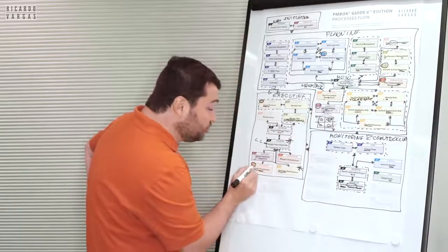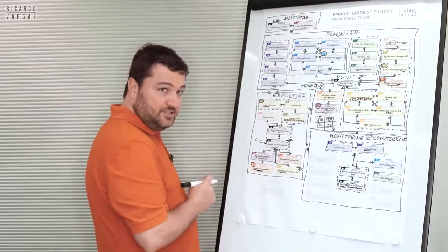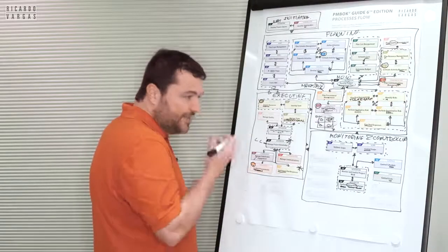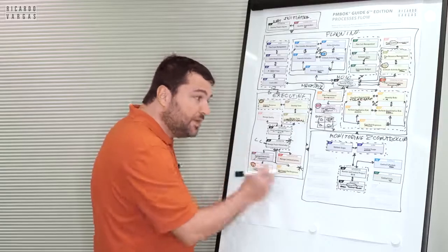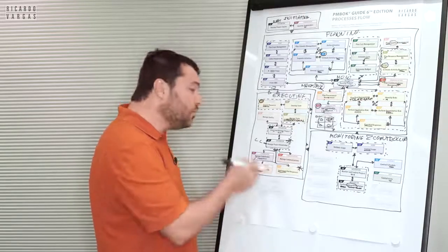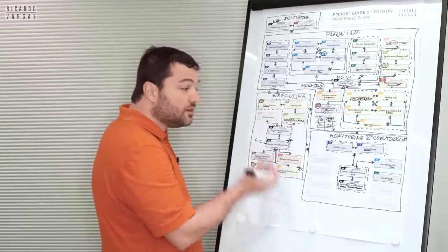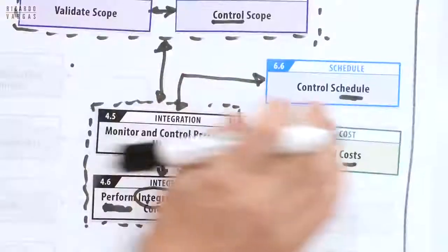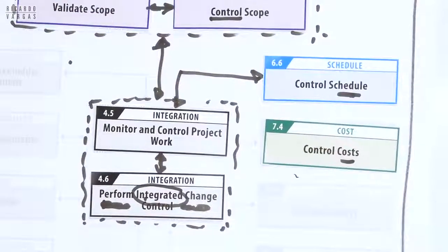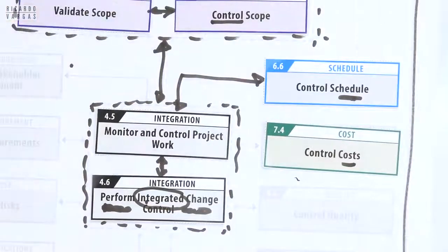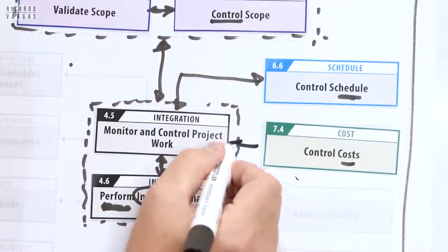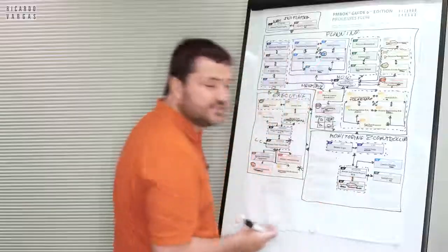Then you did a procurement process in 12.2 to hire or to buy this resource. And then the resource was much more expensive than what you expected. Then you start running over budget. Then you need to control this cost. So this is exactly how things work here. It's a very fluid process.